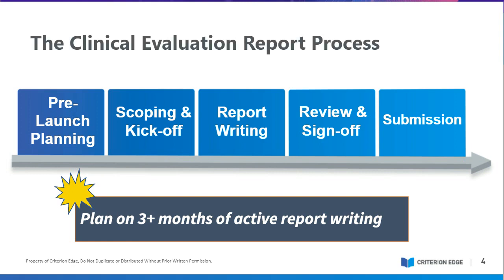I'm going to have some key tips here and there on some of my slides, and the key tip here is to plan on 3+ months of active report writing, at least. Anything less than that, you're beginning to cut into critical time that either your team or your medical writing team or vendor is going to need to actually write this, probably the most complex single report that is required in our industry. This is a very, very complex report, if you haven't figured that out already, which I'm sure you all have. So 3+ months of active report writing right there in the middle.